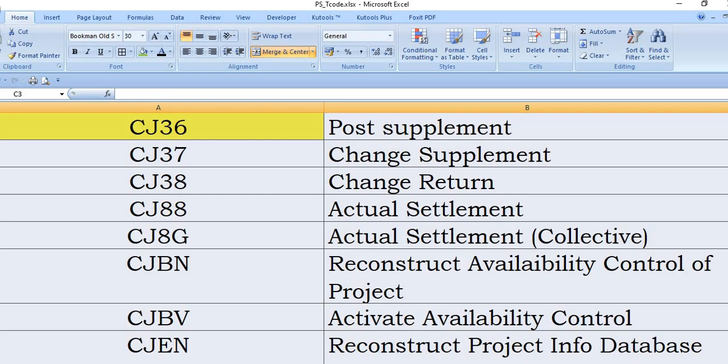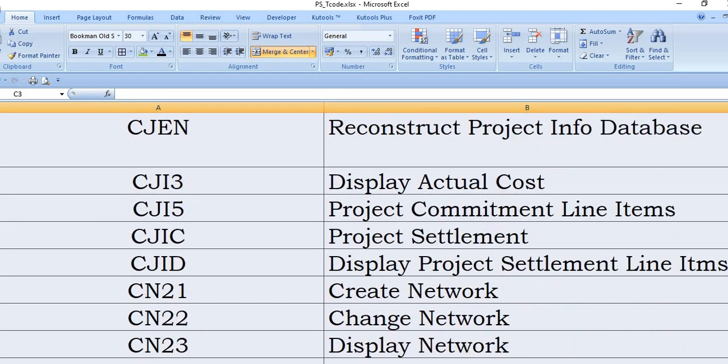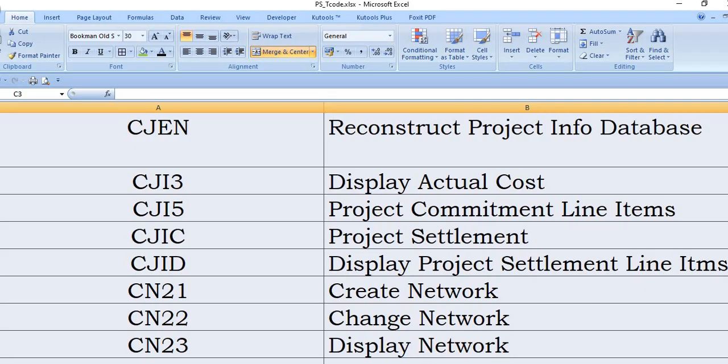CJBV: activate the availability control. CJEN: reconstruct the project info database. CJI3 is a SAP transaction code to display actual cost of the project. CJI5: project commitment line items. CJIC is used in project settlement. Basically, it links the fixed asset or cost receiver element to the WBS. CJID: display project settlement line items.